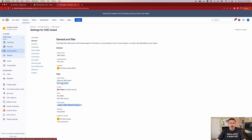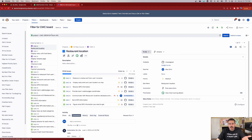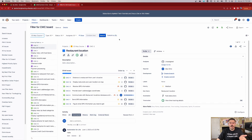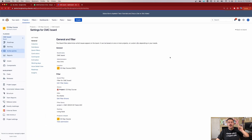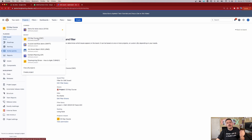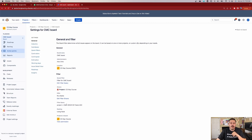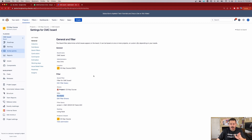If you click on 'edit filter query,' you can change it — it's just JQL, so you can type it or switch to basic, set your conditions and criteria, and hit save. Now, if the save button doesn't work for you, that means you're not the author of the filter. You'll need to hit the back button to get back to your board. There's an edit section that shows 'no shares,' which means only the author of the filter — most likely the administrator — is the only person allowed to make changes and save them.